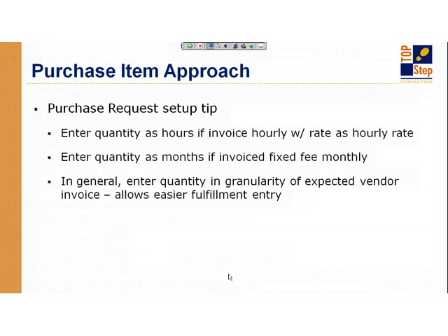So the purchase request setup tip, if you have to go through the formal process with getting approval from everyone to say that yes, we can buy 15 hamburgers, we're just going to buy them 5 at a time, then the setup tip, if you go through that full-blown procurement process, is that make sure the quantity reflects the number of things you are purchasing. If it's services, maybe it's the number of hours. If it's hamburgers, it's the number of hamburgers. If it's the number of notebooks, training notebooks from a vendor, it's the number of notebooks.